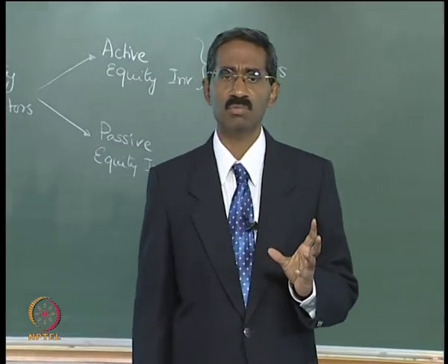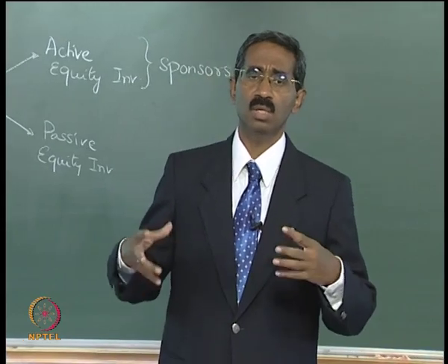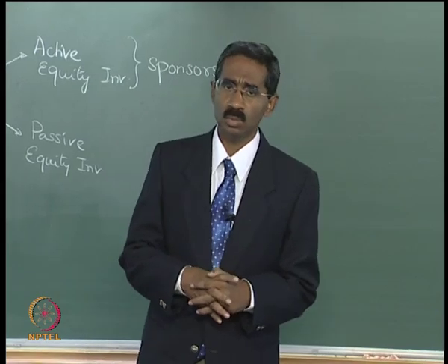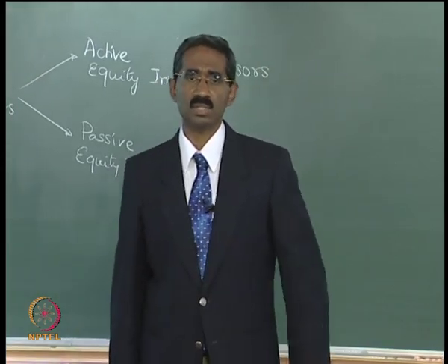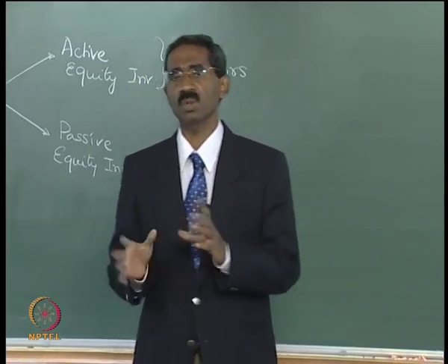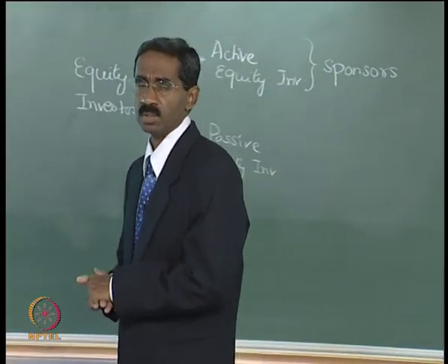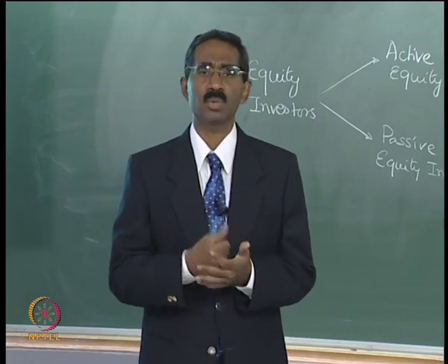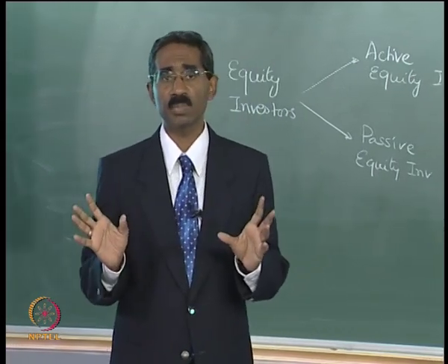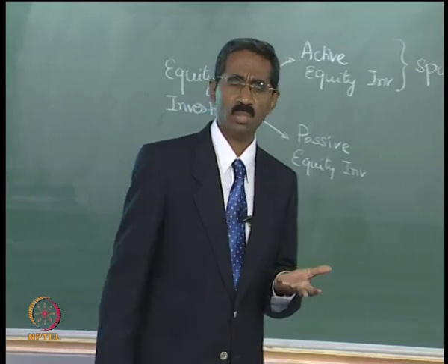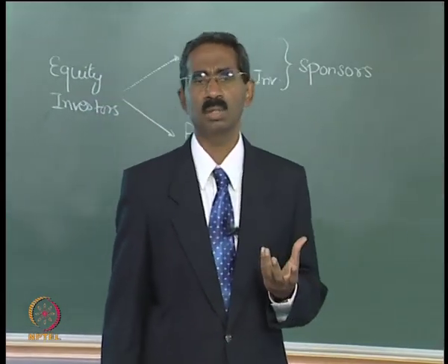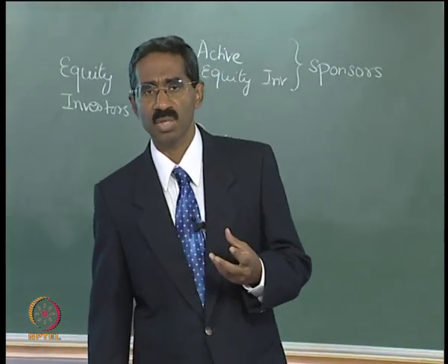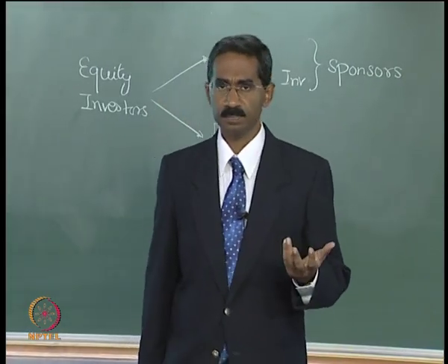Many times you will have substantially a lot of construction activity involved in these kinds of projects, so it is done by specialized construction firms. So you have what is called your construction agreement. Most of the time these are all bundled together, engineering, procurement and construction, and they are called EPC contracts. So EPC is a very important part of the contractual agreement that exists between the project finance company and the contractor.